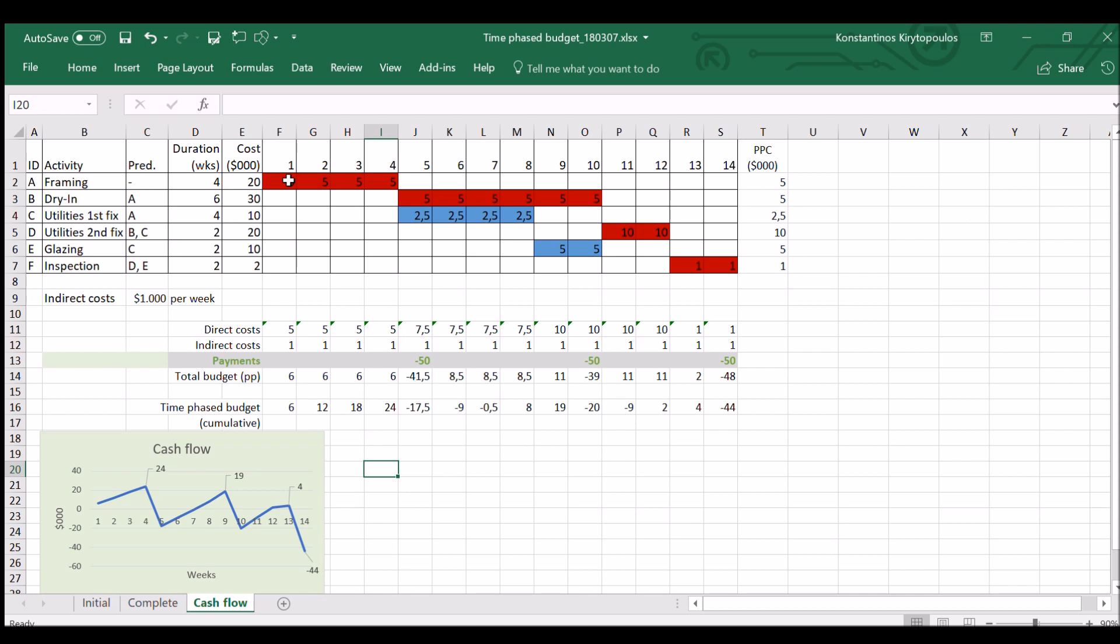And this would be when the expense would be recorded in a cash flow. So the cash flow is telling us not about the commitment of payment, but when the exact payment is happening. So in this case, I haven't changed anything. I assume that everything is really paid, so the expenses are really paid when they occur. But on the other hand, what I've done is that I've introduced some payments.